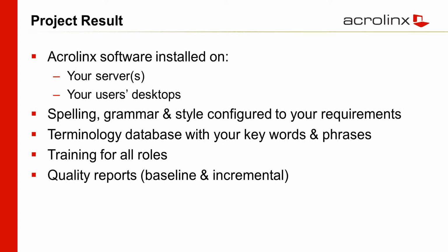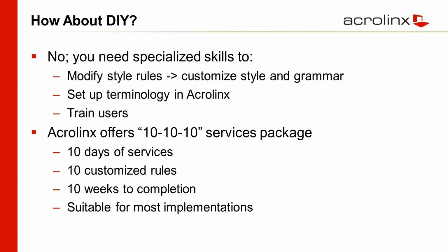The rules for spelling, grammar, style, and tone of voice would be configured to your requirements. You'd have built at least the starting point for a terminology database with all of your keywords and phrases installed. Everyone's trained up. And you have a starting point for being able to keep track of content quality on an ongoing basis. We'll start with a baseline report, and even during the implementation phase, keep track of content quality changes, and then over time you'll be able to continue to keep track. So that's what you end up with at the end of the implementation project.